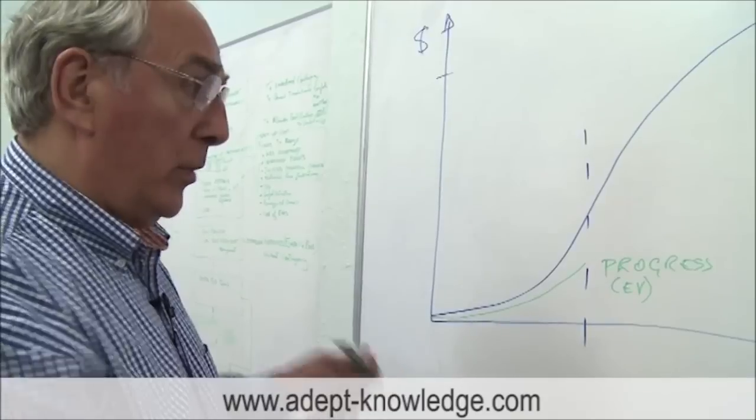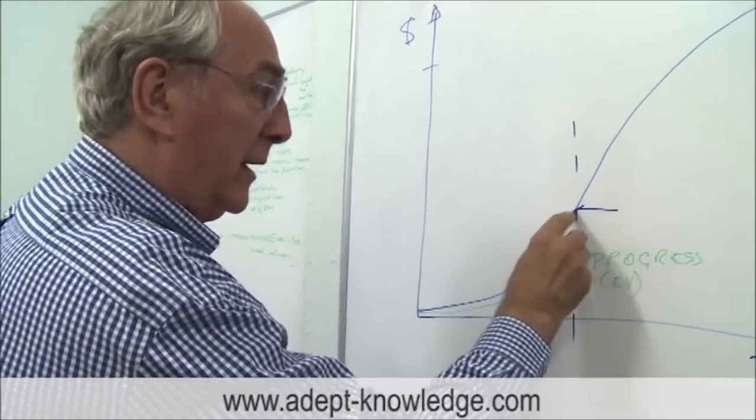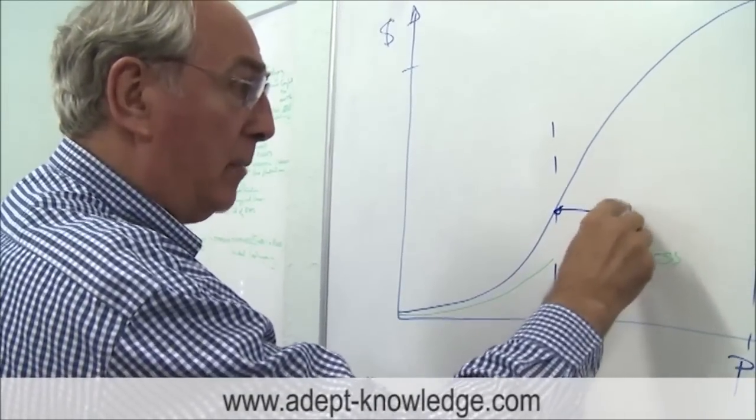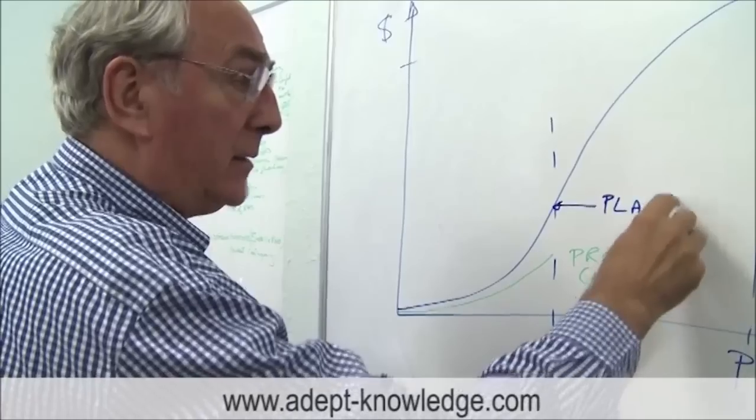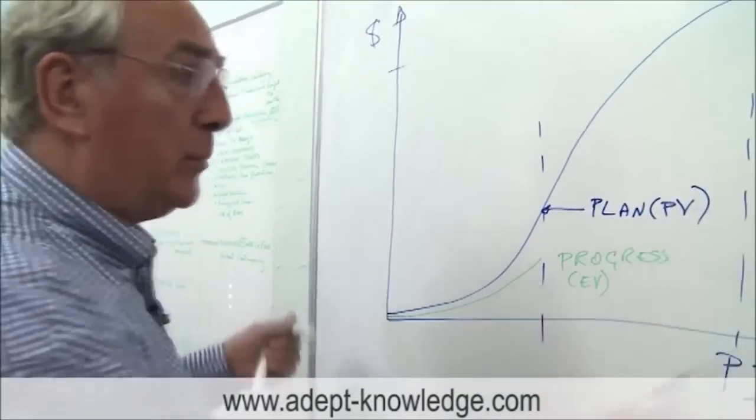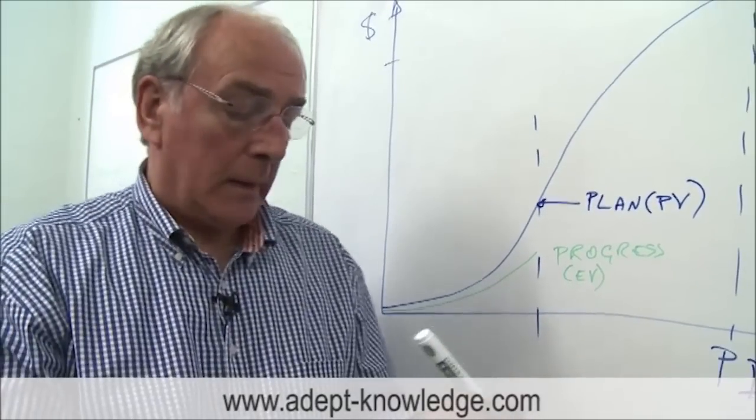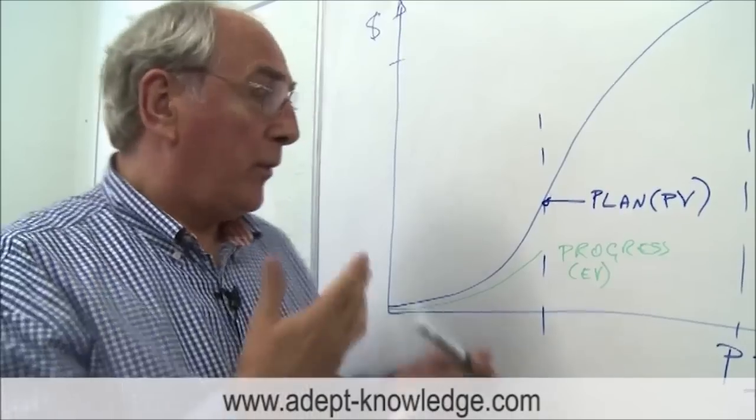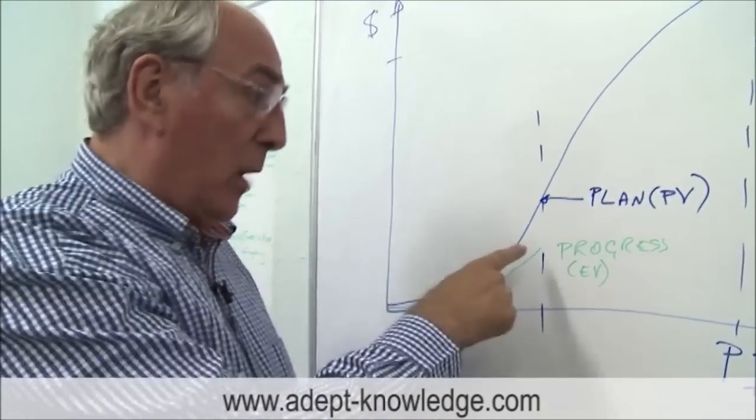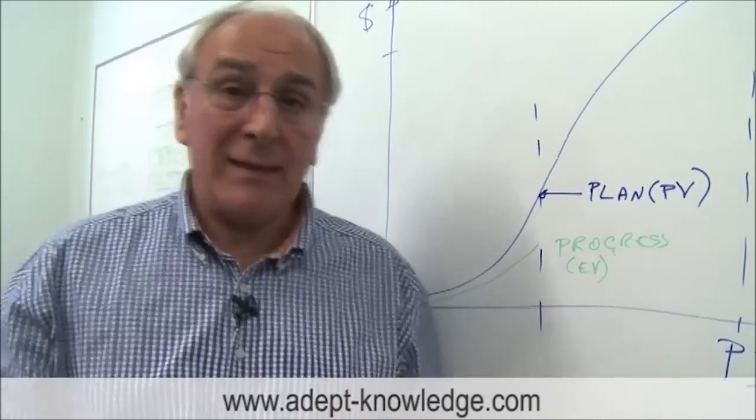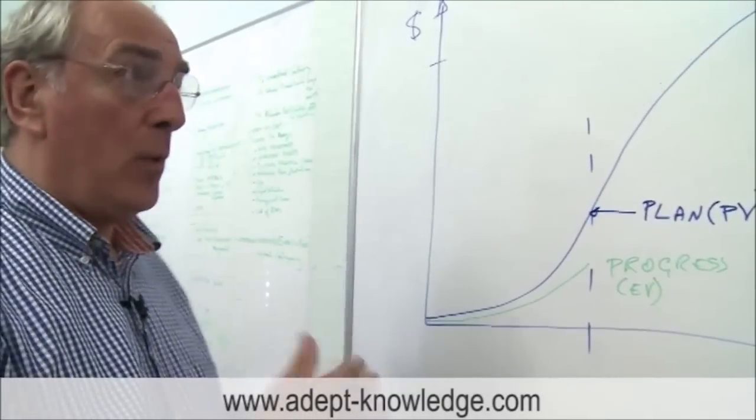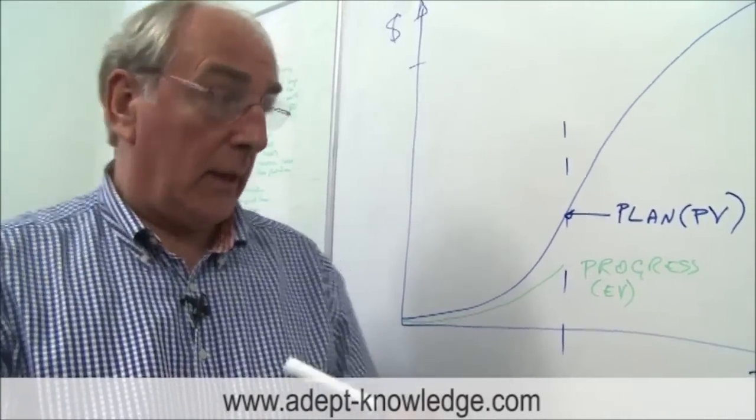We compare that with this point here on our baseline which is if you like our plan, that's sometimes called the planned value. I'm just putting PV there. So we immediately know this is where we are in relation to where we plan to be, that's pretty vital and from there we can do some forecasting things.